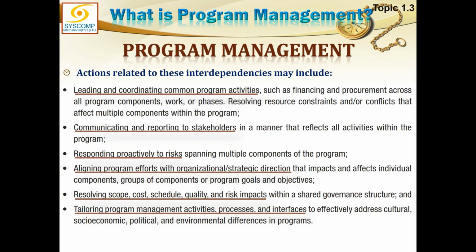Then, because it is centrally controlling everything, the purpose of the program is common for all projects, and they might have the same stakeholder to whom it has to be reported, and they have to be communicated with. So such stakeholders which are common to all projects or most of the projects would be communicated and reported by the program manager. So communicating and reporting to stakeholders in a manner that reflects all activities within the program.